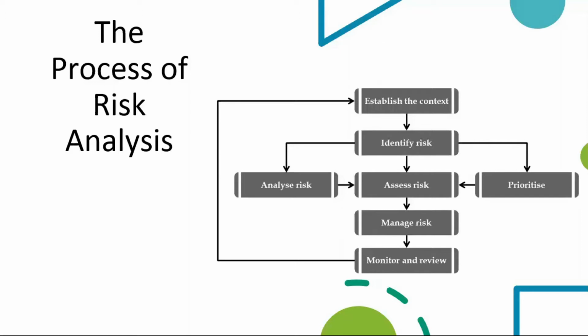If the risk is misuse of funds, it is a severe risk that needs to be dealt with as soon as possible. After determining the severity of the risk, it is important to manage the risk. If there is a misuse of funds, it's important to determine who is doing it, how much it is, and what the action steps are.